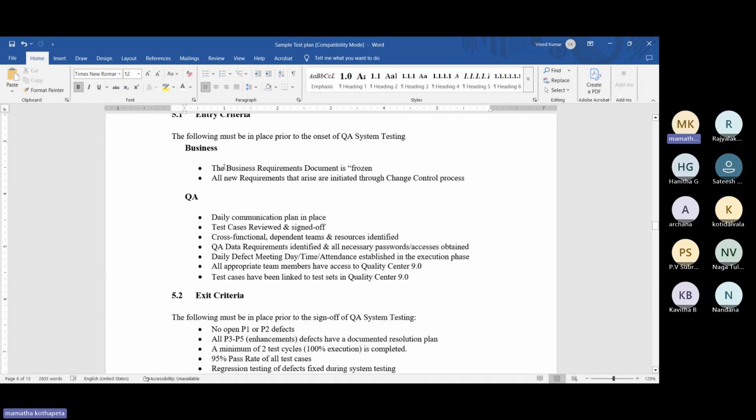Now, let's say the customer has given 10 requirements and BA has captured the 10 requirements inside the FRS or BRE document, then BA will take the acceptance criteria. Yes, these are the 10 requirements, customer. We have agreed, yes. Once they say that requirements are now freezed, there will not be any change in the requirements. The ice is frozen, it means blocked, right? It is not a liquid form. The same word they have used, stating that the BRE document should be freezed.